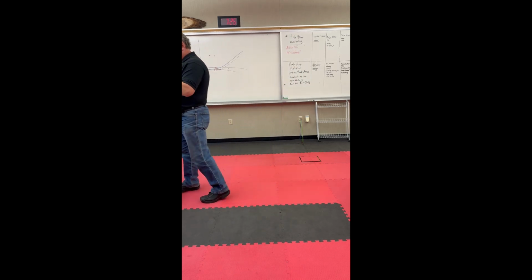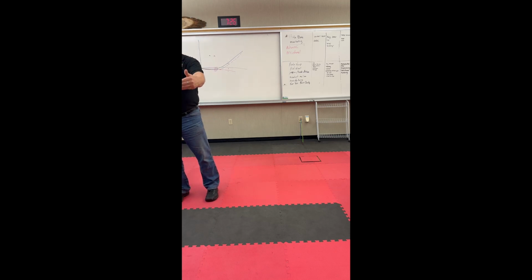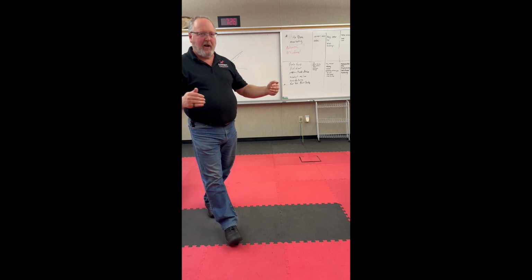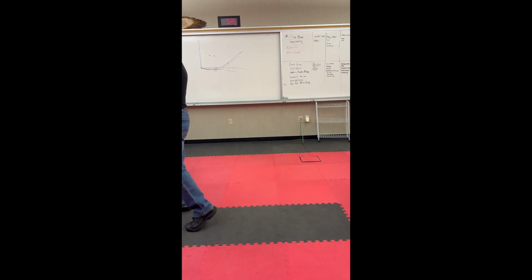All right, so when we're looking at these milestones, the main thing is to take the end date, a hard end date, to have an MVP and a presentation ready to go on a certain date. Then go backwards: what does each of those slides need to be, and what do I need to do to get the information for that slide? Then go backwards again: in order to have that slide, I need these 10 things, and I need to start them at this time frame. When you're looking at your experimentation and creating your MVP, work your way backwards.